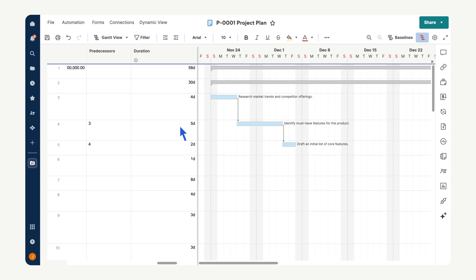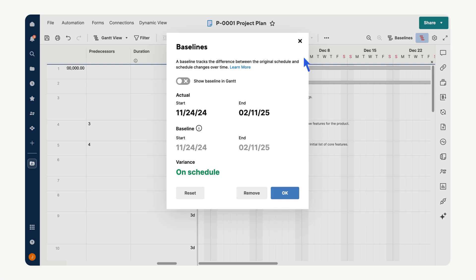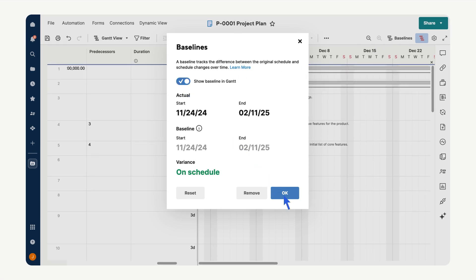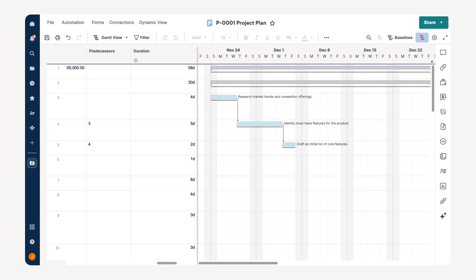To set a baseline to track your project's progress against the original plan, select the baseline tab, show baseline in Gantt, then okay to capture the current state of your project timeline. As tasks progress, compare the baseline with the actual timeline to identify delays, changes, or areas that need attention.